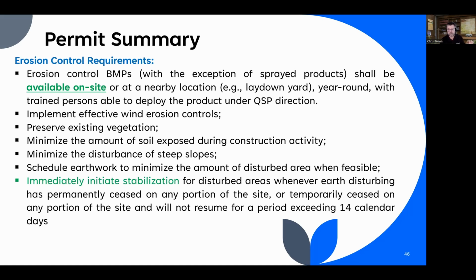You must have a stockpile of erosion controls. It's a permit requirement on site, not spray on products, but other projects. I would get a stockpile of BMPs: fibril, rock bags, visqueen, erosion control blankets. It's a new permit requirement.